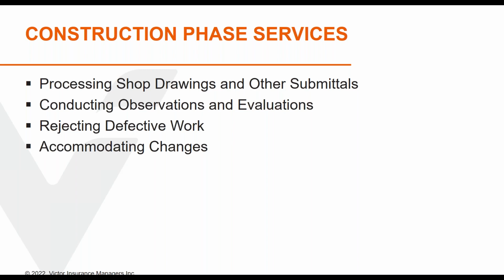And construction almost always involves changes. There could be a differing site condition, a change in the owner requirements. All of these changes have to be negotiated in a contract, in a change order to the contract. And oftentimes it's you in your role as an engineer and architect who works out these changes and makes sure that both parties execute these changes and everybody's on the same page. If these things are not done in a timely manner, they don't go away. They just become claims later down the road, and clients need to understand that.